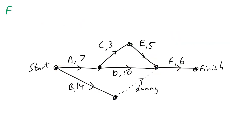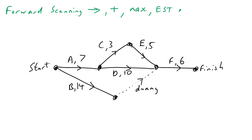Now I'm going to do some forward scanning, which will help us find a lot of information including the critical path and floats. Forward scanning: you go forwards, you add your numbers, and you take the maximum if you have a choice. This gives you the EST — the Earliest Start Time. Then we'll do backward scanning, which is pretty much the opposite.